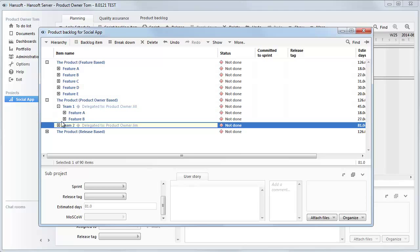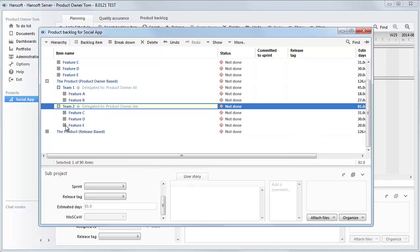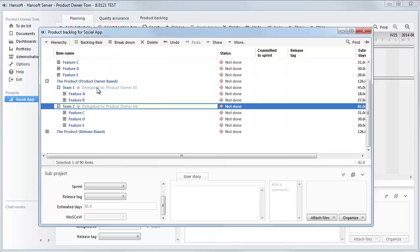And in there, they have their features that they're owning. This brings up an important point here. Delegation is like giving main manager rights to a section within the backlog or the project schedule. I usually recommend that you only have one main manager per project. The main manager is responsible for the whole structure of the project so that it's easy to find where things are. And then use delegation to give people rights to edit in different sections of the project. You can think of a project like a file server. You don't want everyone to have root access because then it will turn out to be a mess in the bottom of the hierarchy. And you won't maintain a deep hierarchy.